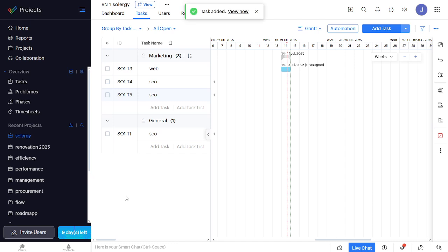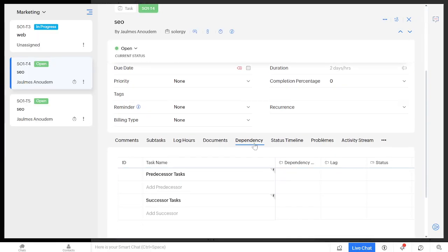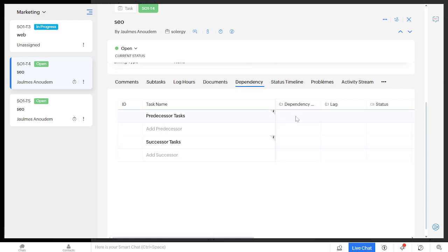Once you've added all your tasks, it's time to set dependencies. Click on a task and drag the arrow to another task it depends on. This is critical because it shows the sequence of tasks and prevents any from being overlooked.